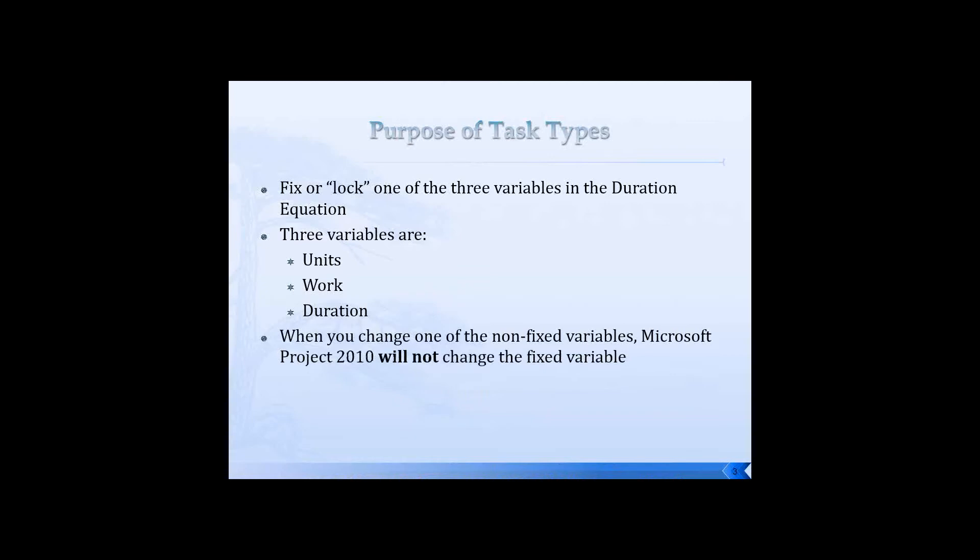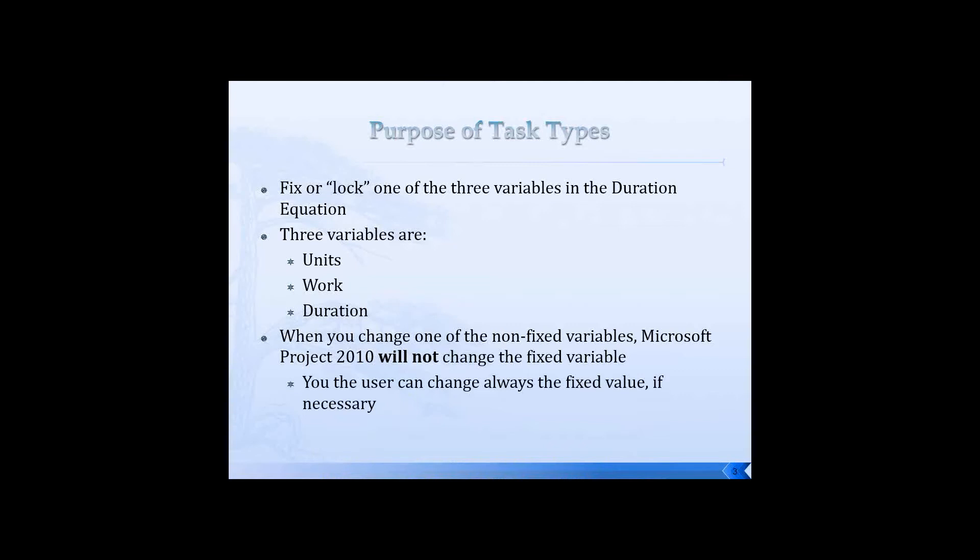Now when you change one of the non-fixed variables, Microsoft Project will not change the one that is fixed or locked. But I want you to keep this in mind: you yourself, as the user, can always change the fixed variable value. You can change it, but Microsoft Project will keep its hands off that feature.